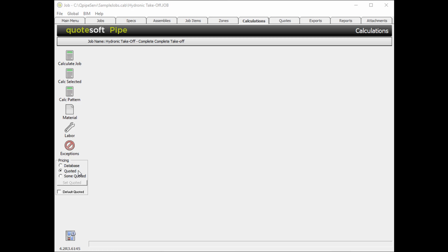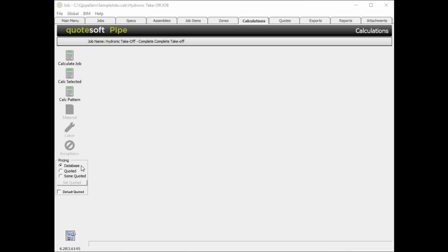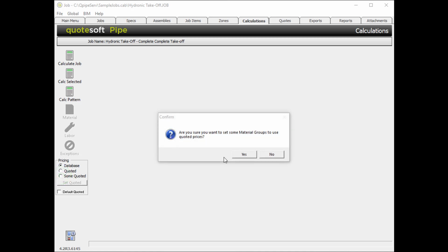When a calculation has been ran with the quoted pricing option selected, all calculated materials will be populated in the Quotes tab. Please watch Training Video 6.1, Quotes, to learn how to utilize the Quotes tab. If you are utilizing a pricing service to establish material costs, but have volatile materials on a project that you would like to have quoted, you can use the Sum Quoted option. You will then be prompted with a dialog box confirming you would like to use the Sum Quoted option.